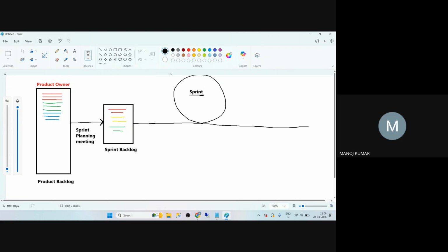How much time do we require, Manoj? A sprint is calculated in 1 week, 2 weeks, 3 weeks, or 4 weeks. You have to choose any one of these. These are standard. We cannot go beyond 4, so you have to limit it to 4. Whatever the developers can do within a time bound of 4 weeks, they should pick up according to their capacity, right? Yes. Got it.